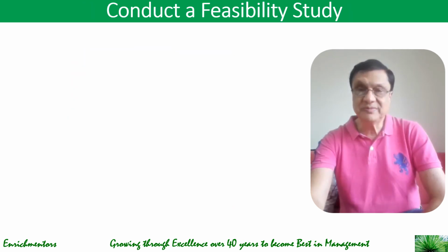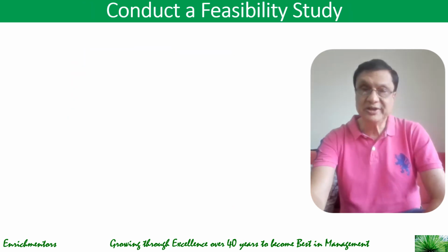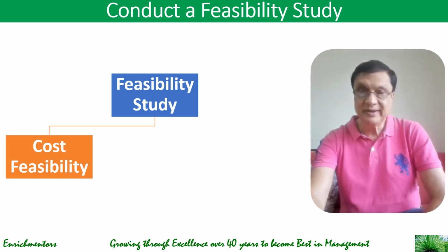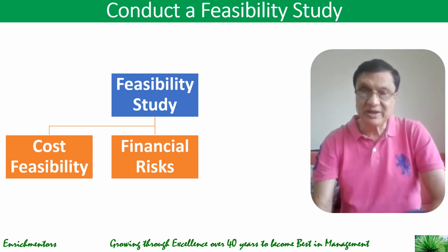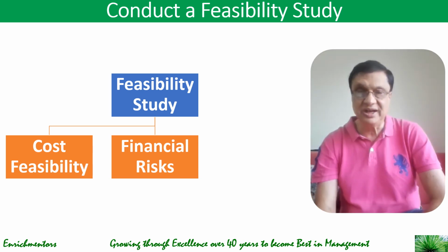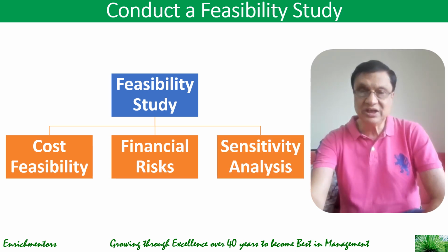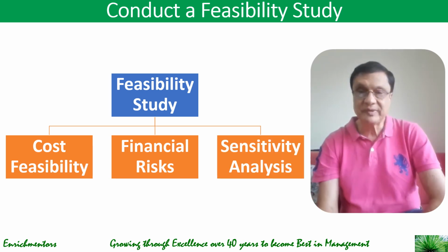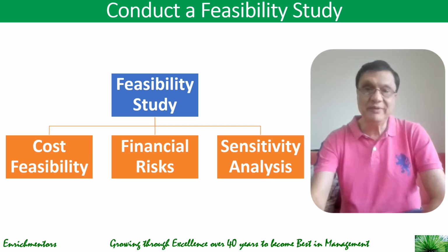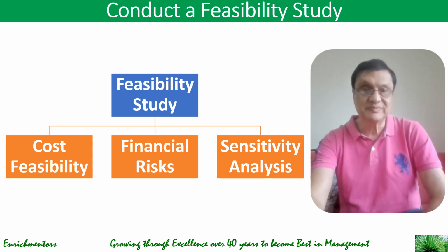Then you conduct a feasibility study, as we had explained earlier, where you assess cost feasibility by comparing estimated costs with available funding. Identify financial risk by evaluating potential cost overruns due to market conditions, delays, or unexpected challenges, and also do a sensitivity analysis by testing how changes in key cost drivers like material prices can impact the budget. So you do a feasibility study like this.